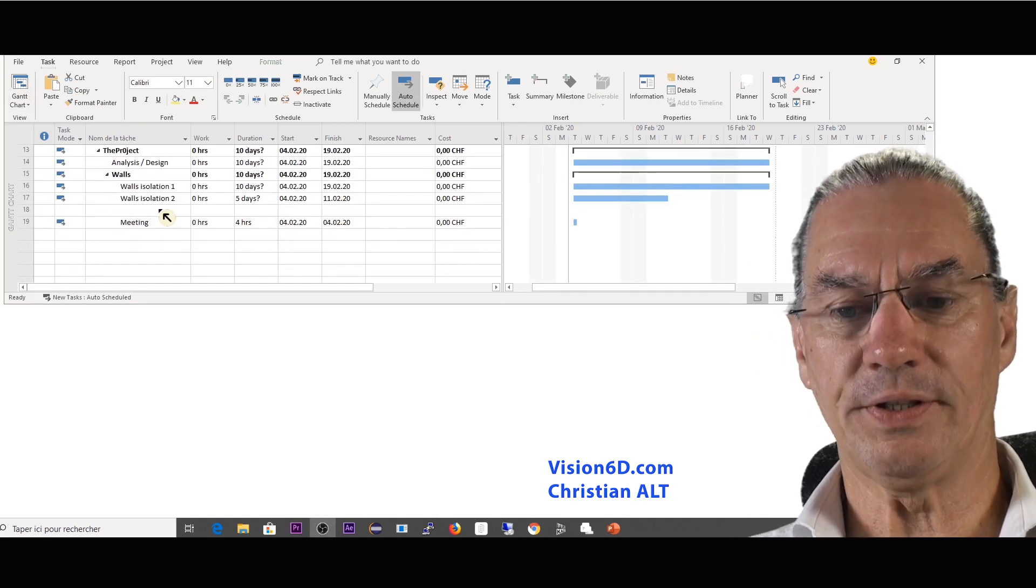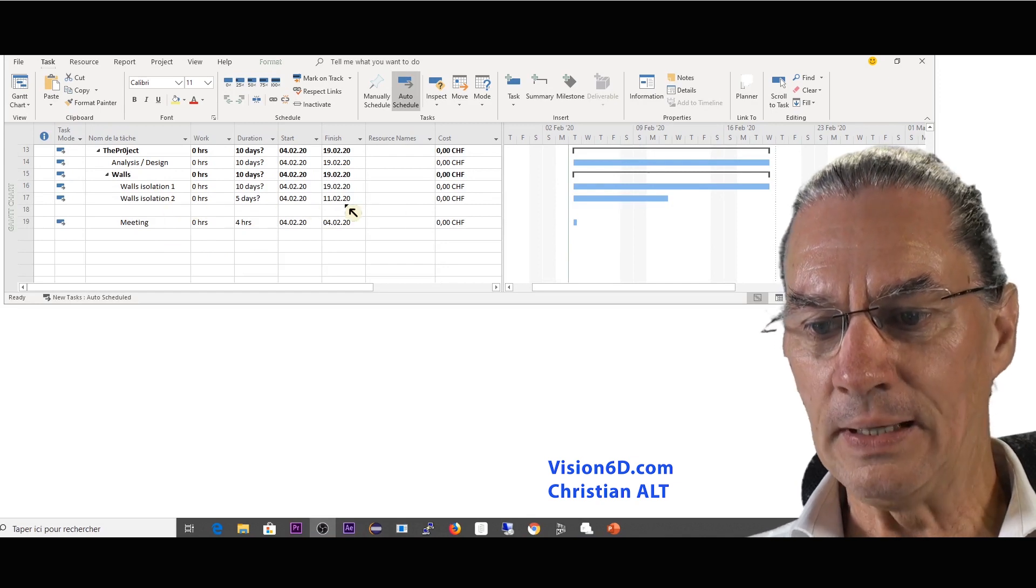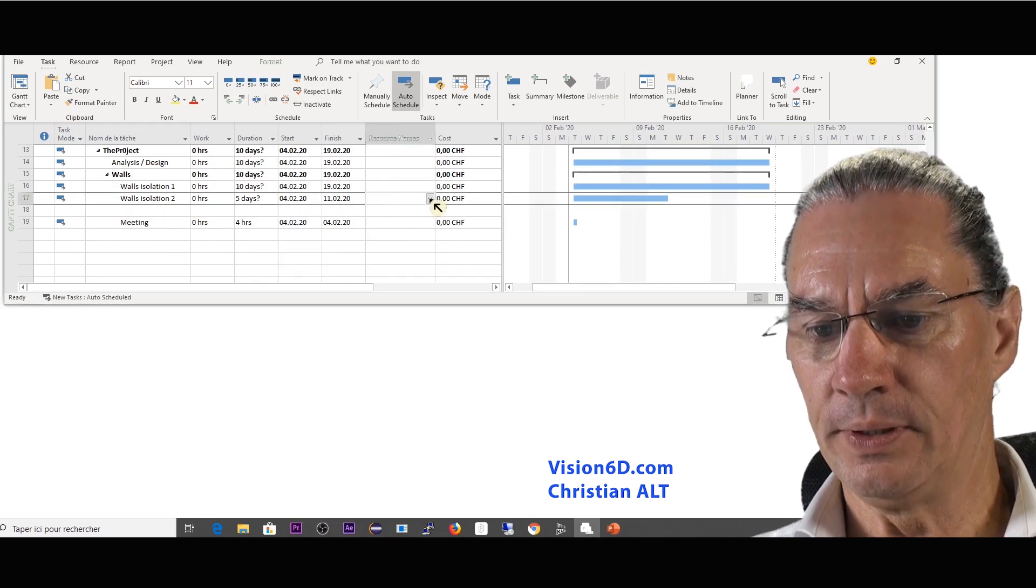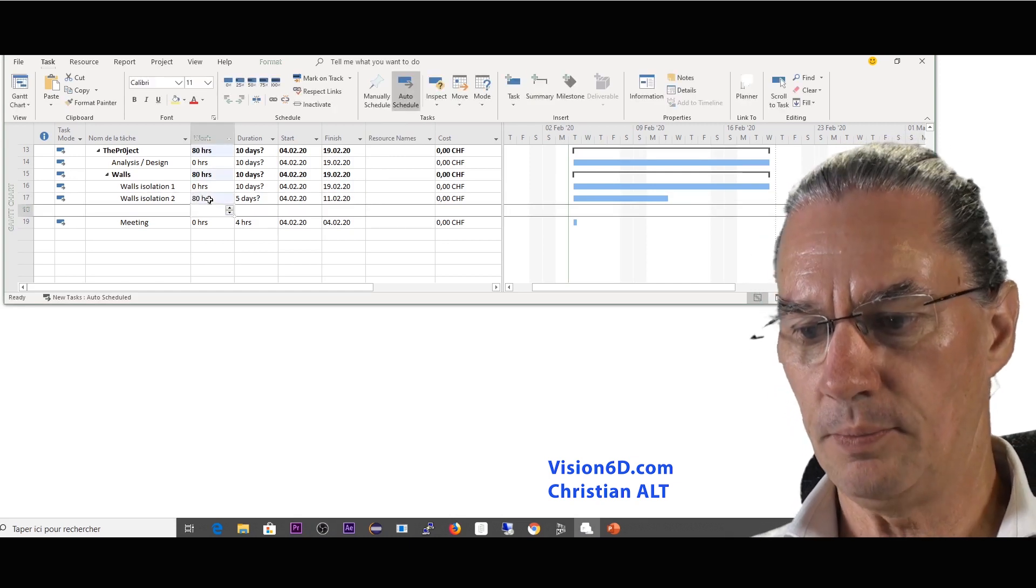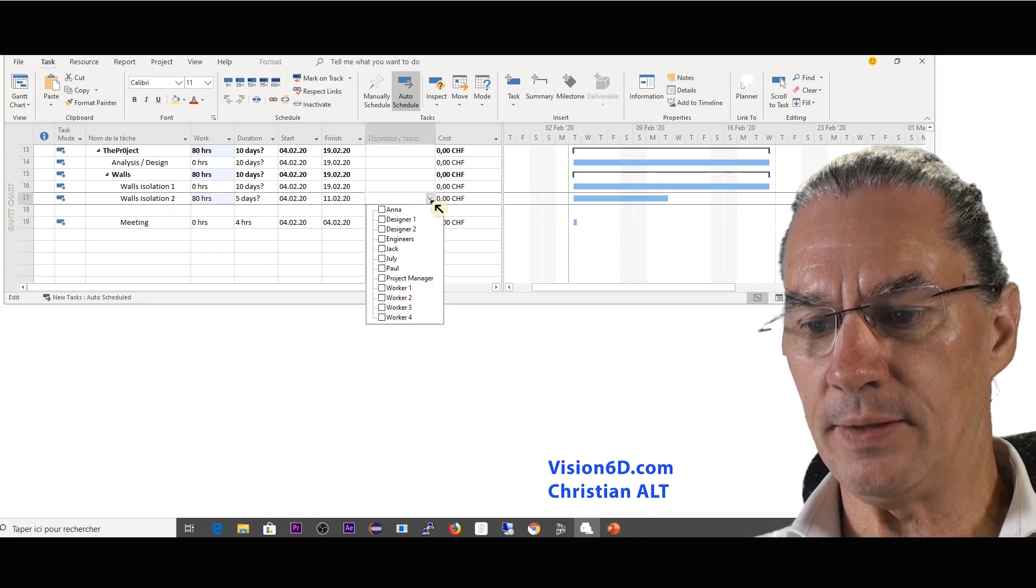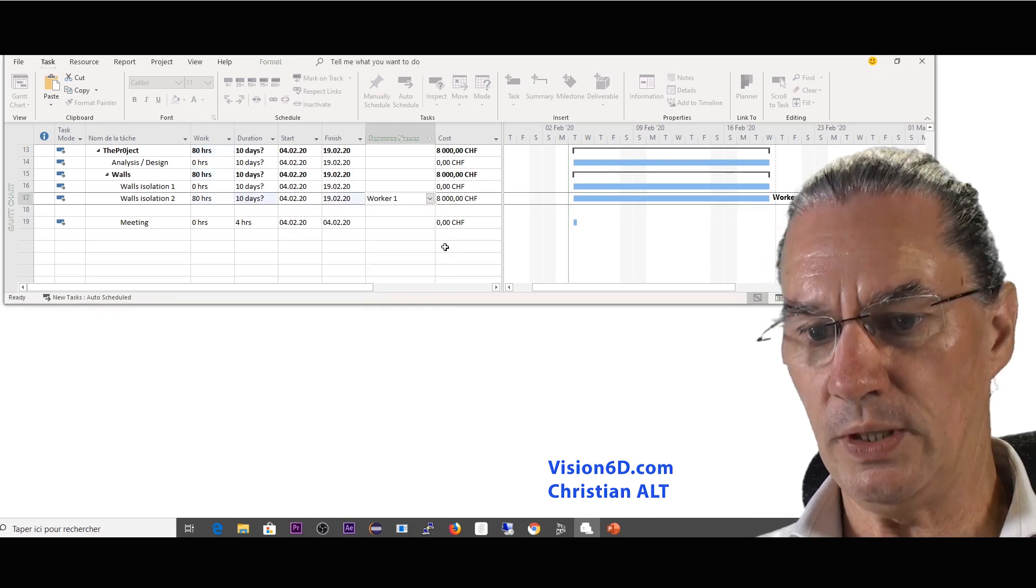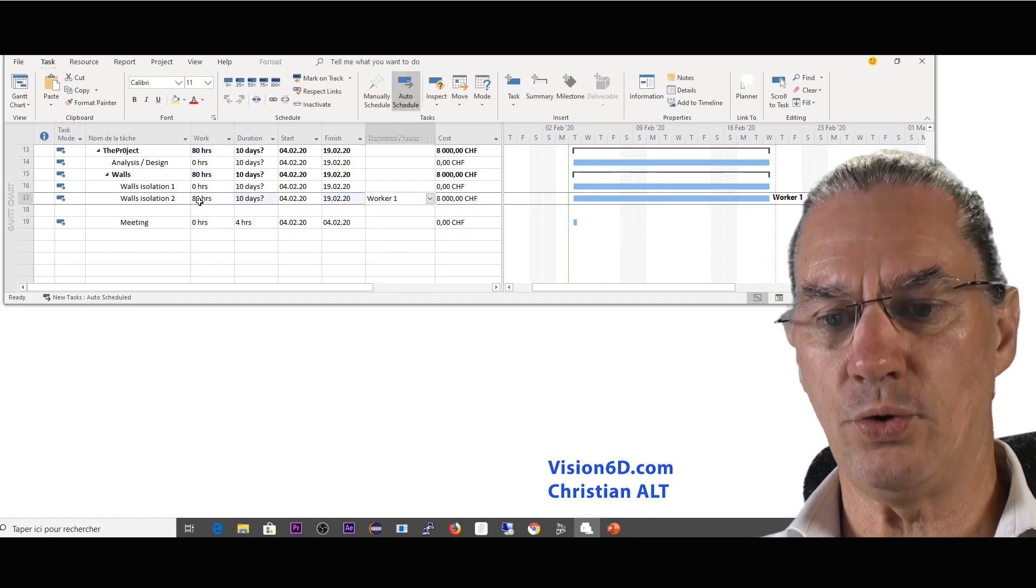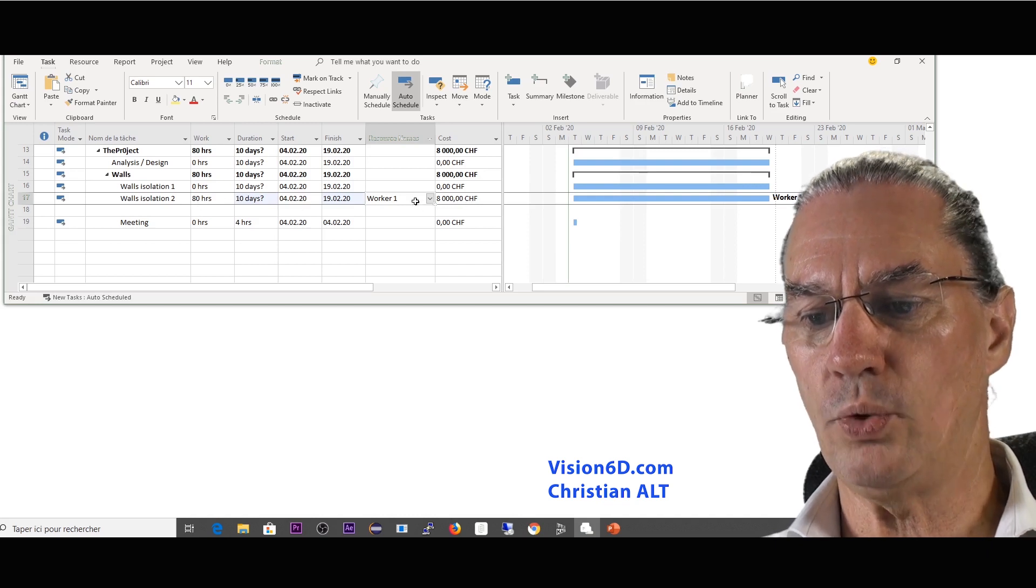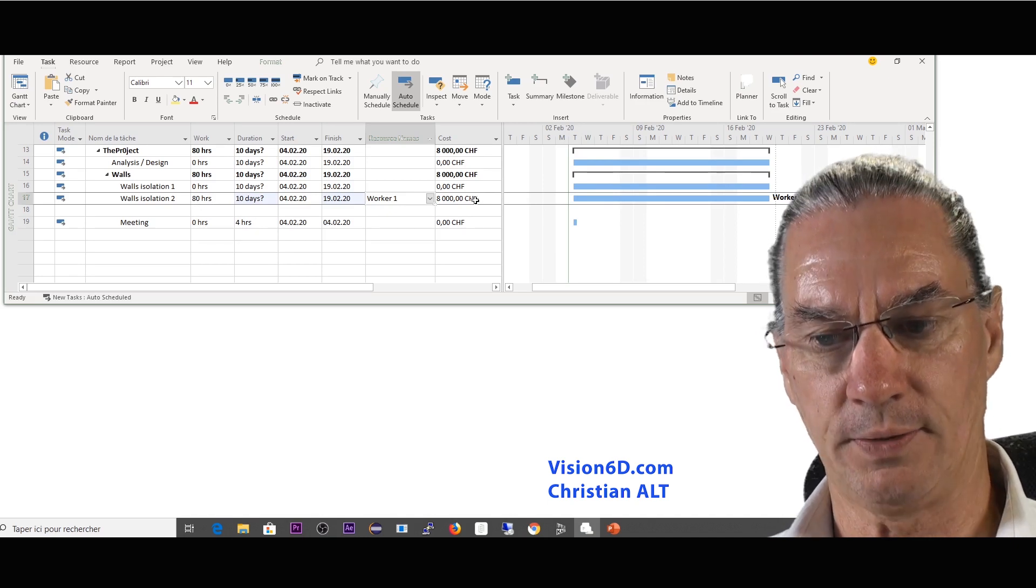So back to the Gantt chart now. I will start here with wall isolation two. First, this was planned as 80 hours and I'm going to assign this to worker one and we'll see what happens. So 80 hours at 100 rate per hour makes 8,000. We have it here really well expressed. This is absolutely correct.